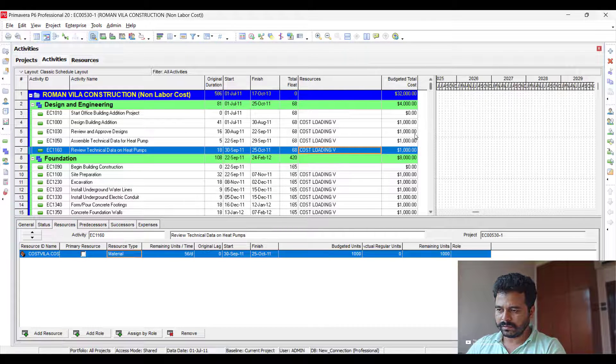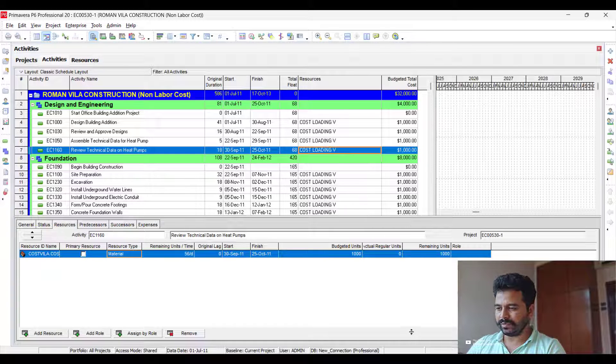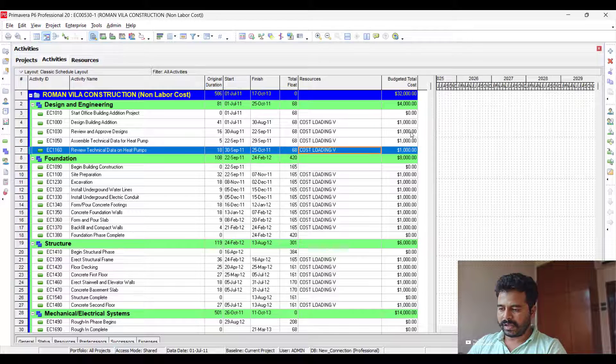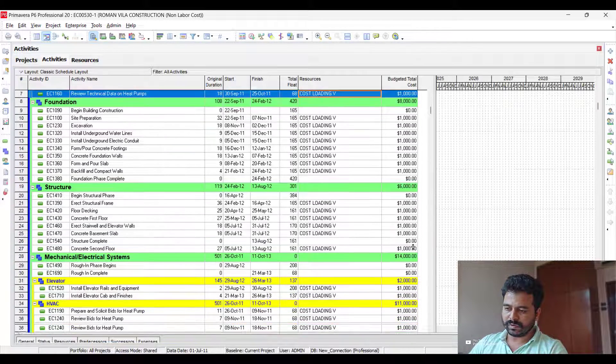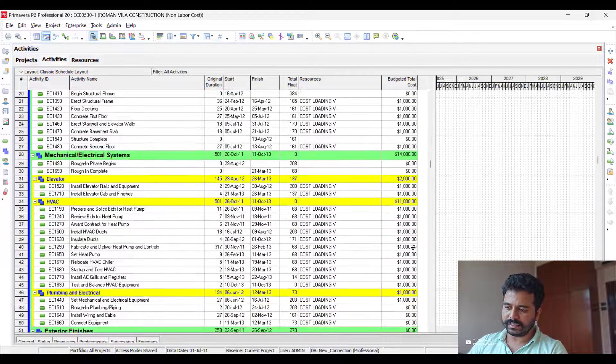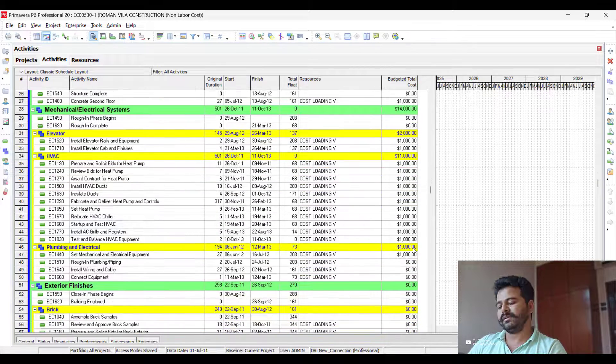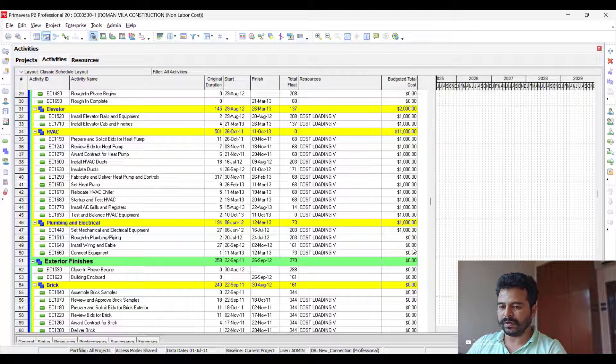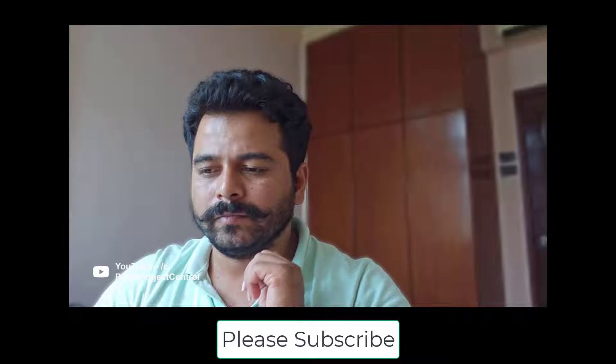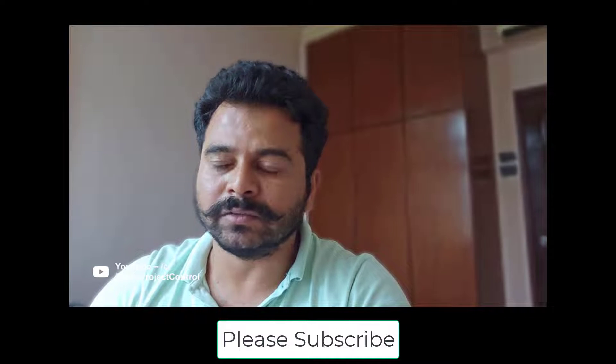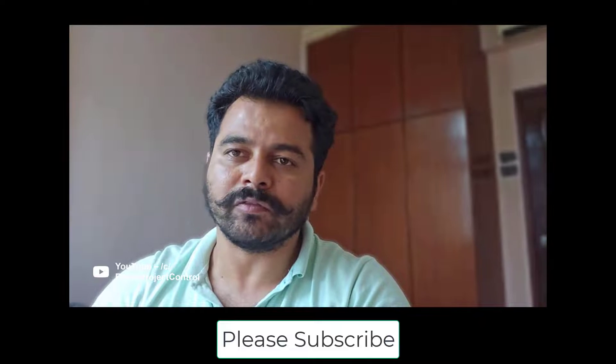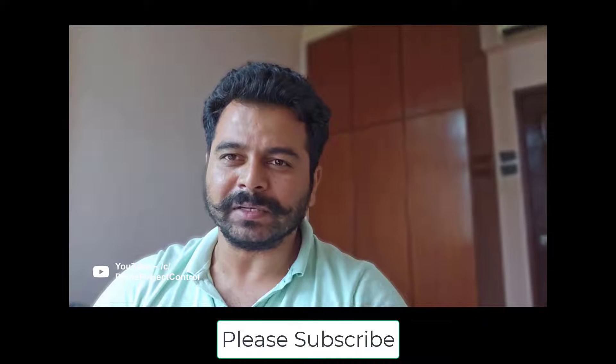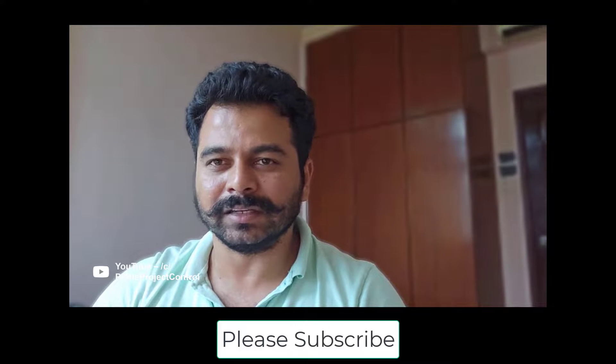You can notice the cost is being loaded. You could see that all those activities I loaded with $1,000 have been input into this. So this is quite simple and the fastest way of doing this. Thank you, that's how simple it was—direct import of cost from Excel to Primavera P6. We'll see you in the next lecture. Till then, take care. Bye.